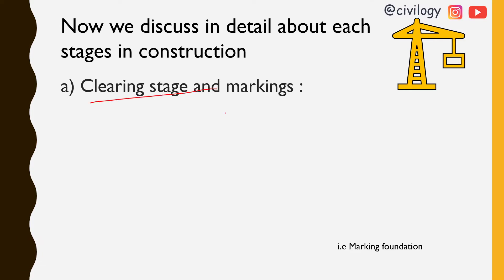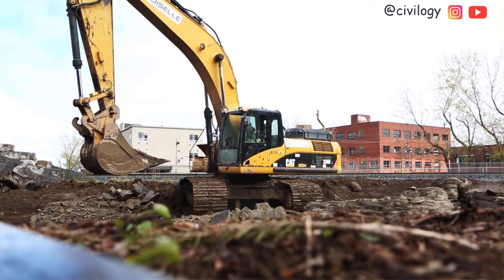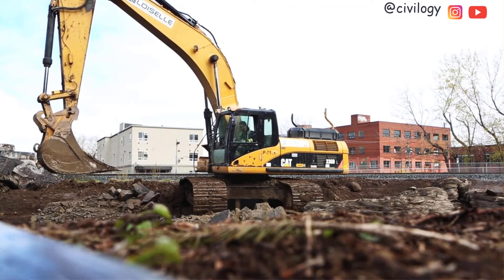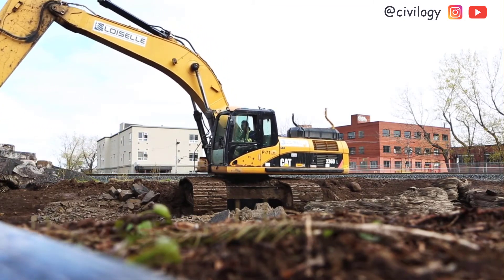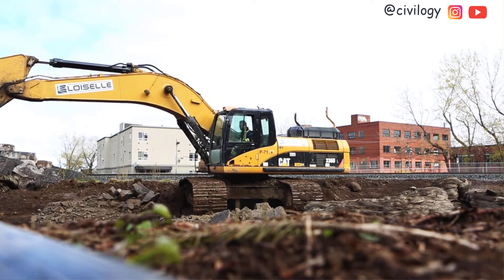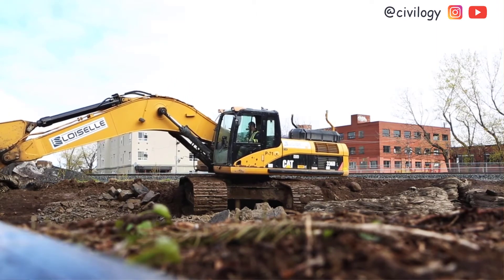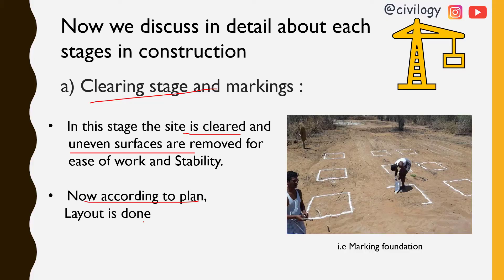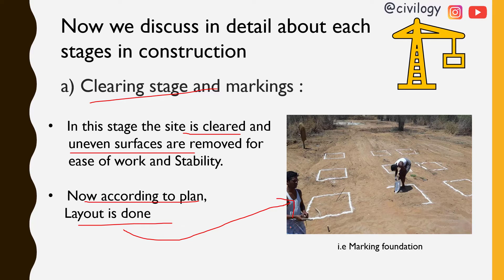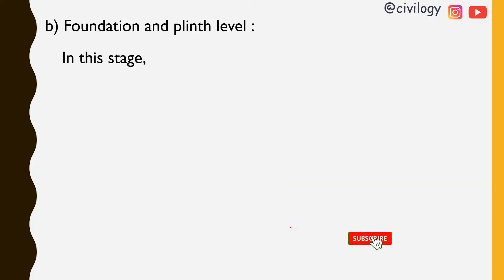In the clearing and marking stage, the site is cleared and uneven surfaces are removed for ease of work and stability. According to the plan, the layout is done — meaning the foundation positions are drawn on the site to guide excavation in the next stage.